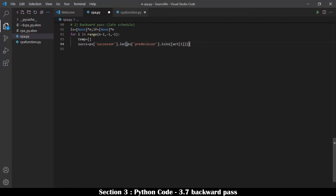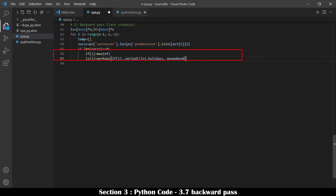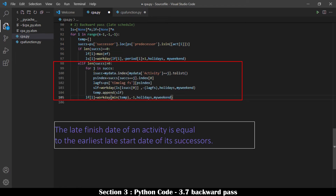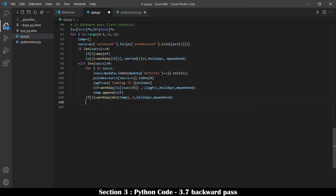Late schedule — late start and late finish (LF) — is calculated along the backward pass. LF is determined starting from the last activity, which has no successor; its late finish date equals its early finish date as calculated in the forward pass. An activity must finish before the earliest start date of its successors, so the late finish date of an activity equals the earliest late start date of its successors. The late start is computed by deducting from the late finish date the activity period, holidays, and weekends using the workday function in cpa_function.py. Other logics are converted to finish-to-start logic in the ps_list function.